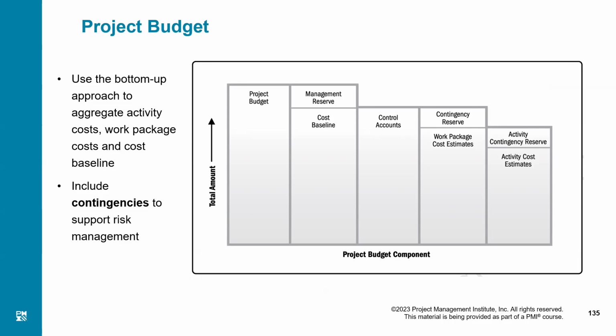one work package. And because a work package is also work, there could be a risk at the work package level also. The work package also reserves a little bit of contingency reserve with them. So all the work packages and their contingencies within a control account are added up, and that is the control account total.